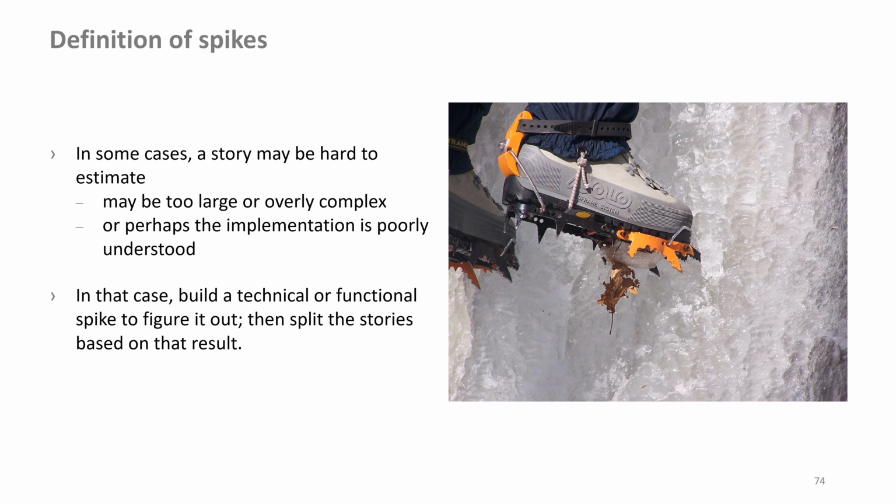A spike is time-boxed, maximum like the sprint it is included in. At the end of a sprint, it is evaluated whether the spike is done or not done, just like any other common user story. A spike is a great way to minimize risk early on, gather feedback, and develop an understanding of the complexity of an upcoming product backlog item.